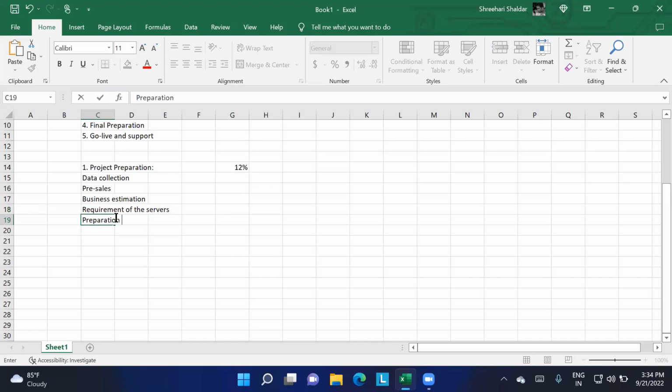Preparation of SOW. What is the SOW? It is nothing but a statement of work. They prepare a document in which they mention that TCS has to go through all these different topics and finish them. So TCS people will concentrate only on that document. If any extra work comes apart from this, they will definitely charge something extra to Maruti Suzuki.